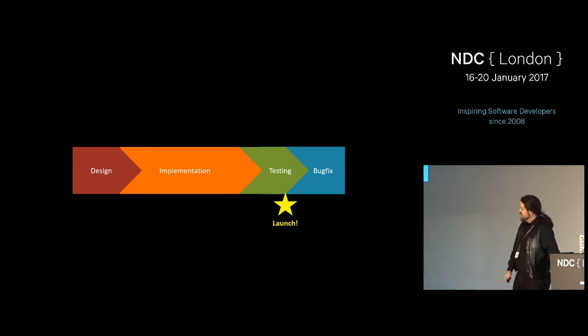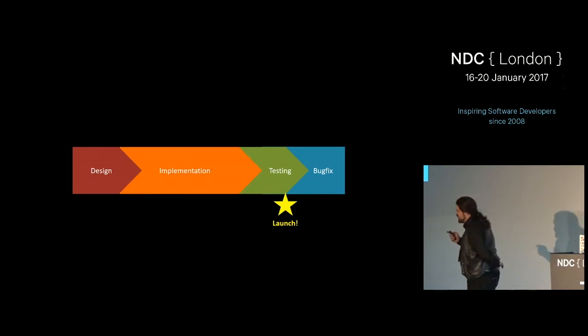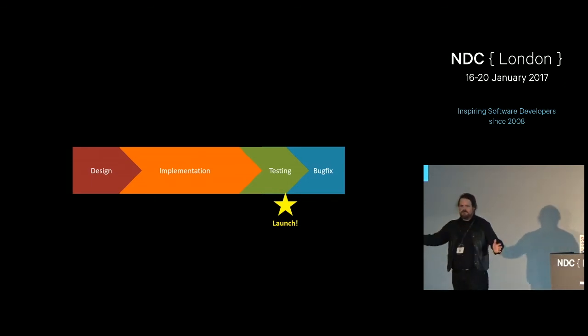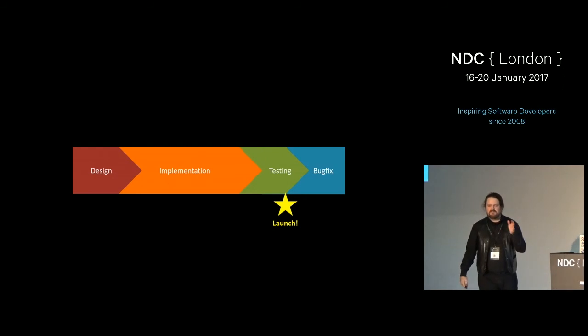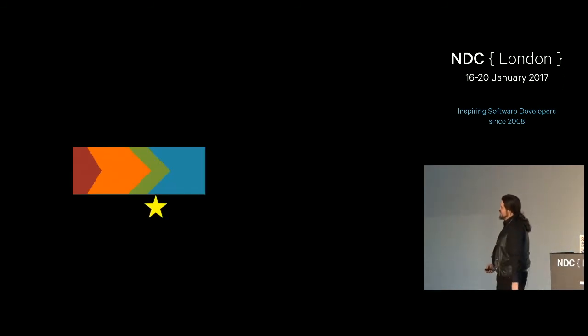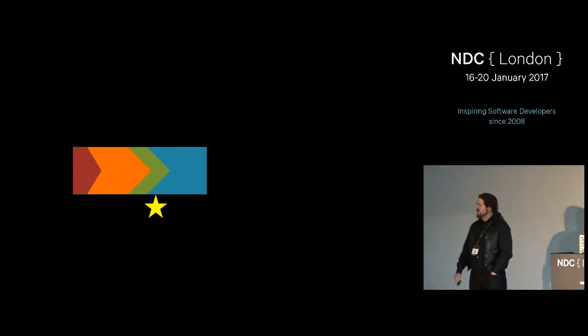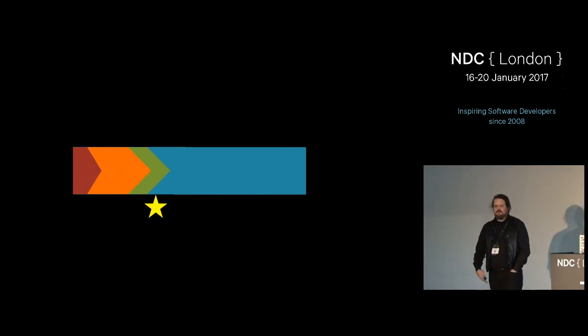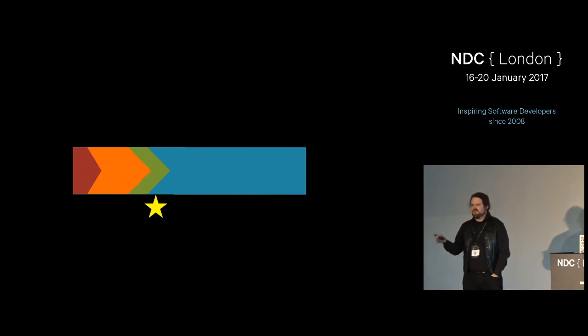Now, this is anecdotal, but based on my experience, if you're doing a piece of development, take the time from officially starting it to the time when a real customer first gets their hands on it. At the very earliest, that is going to be halfway. If you're 8 months into a project and you haven't shipped anything yet, you're going to be at least another 8 months. If you are 2 years into a project that you're confident is going to be a 2-year project, it's not.